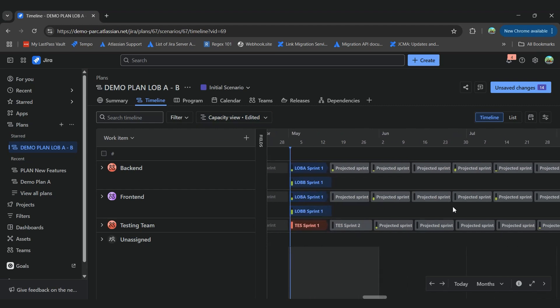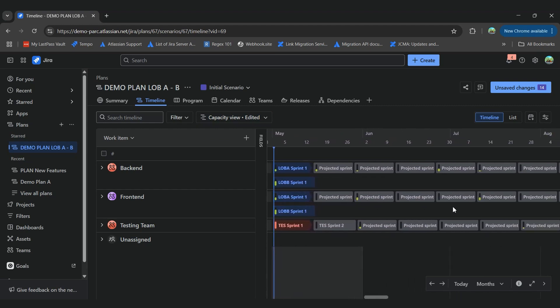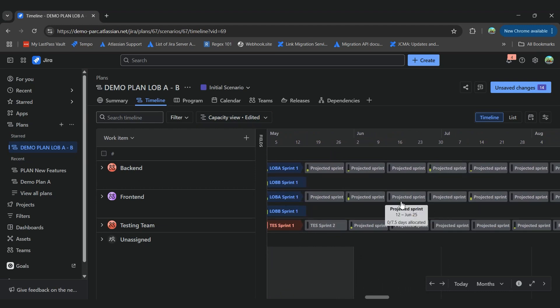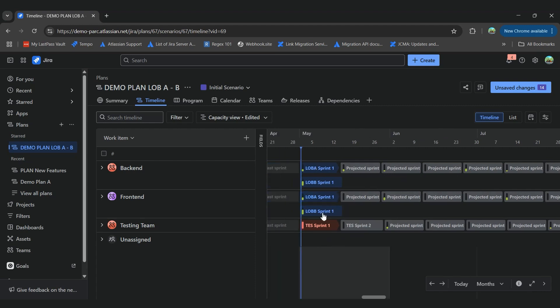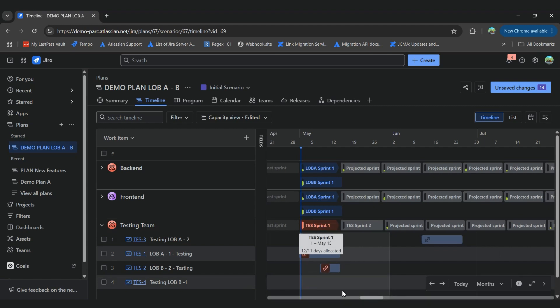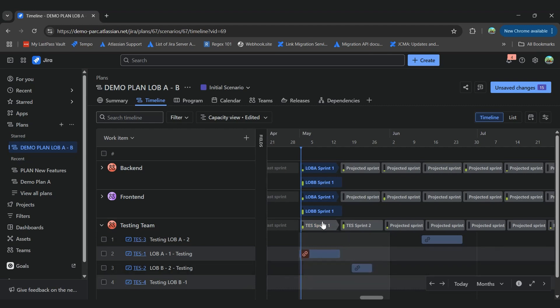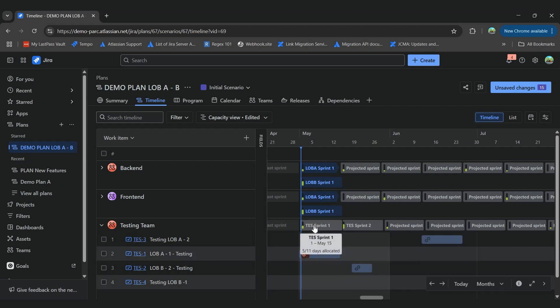So for example, here we are seeing that we have some tasks planned for teams for July, for June, for May, but on May, we have our testing team with a lot of work, and it's going over capacity. So we can move the last task around to the next sprint, and we won't see the exceeding capacity of our team again.